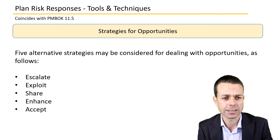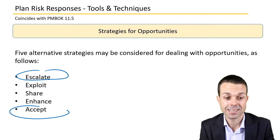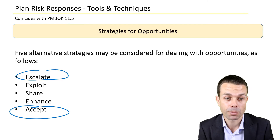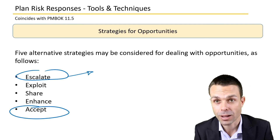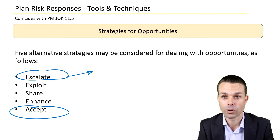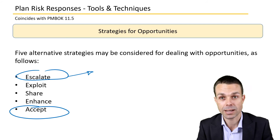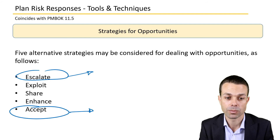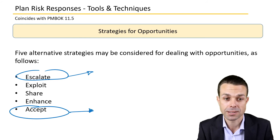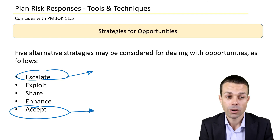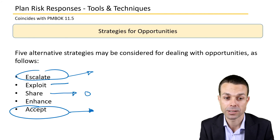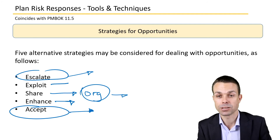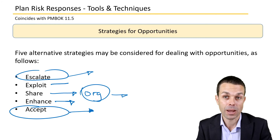It's similar for opportunities — escalate and accept appear in both. We might escalate an opportunity to a level beyond our project so everyone understands it's there. Accepting an opportunity means basically doing nothing but acknowledging it exists. We could also exploit the opportunity, share it with another part of the organization or another company, or enhance it — taking advantage of it and making it even better than it already was.